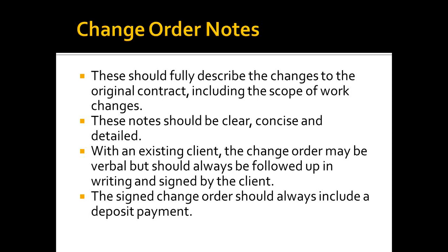Probably the best or worst story I have on change orders was from when I was working for somebody else many years ago. They had done a large project I was involved in with a household name. Unfortunately, at the end of the project, this very well-known person said to my boss, I'm not paying $42,000 worth of change orders. This was primarily because they had not been signed by the client. A lot of the change orders had been signed, but $42,000 had not. My employer did not receive that $42,000, and it had a significant impact on the company.